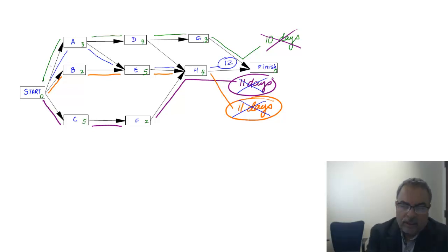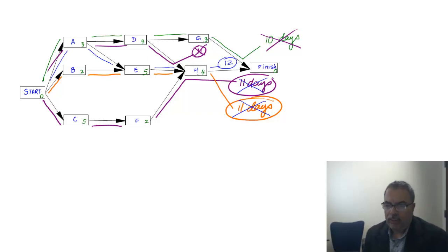Let's go do it. We go again to A, that's 3, and we go to D, that's 7, and we go from there to here. That's what? 7, we're talking about 11, right? So another 11 days, therefore it's not good. So right now, the winner is the 12 days. I'm going to check if there is any other one, and there is not.